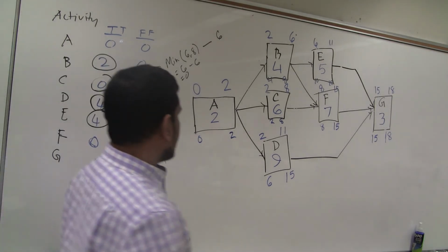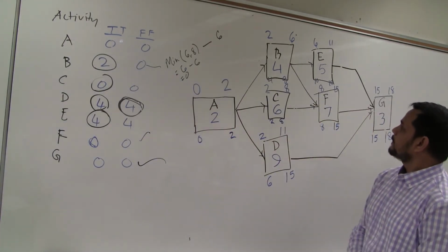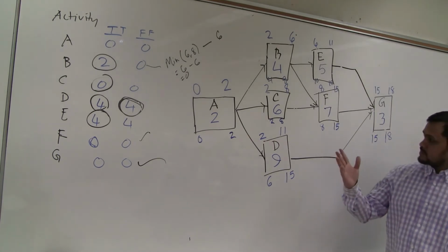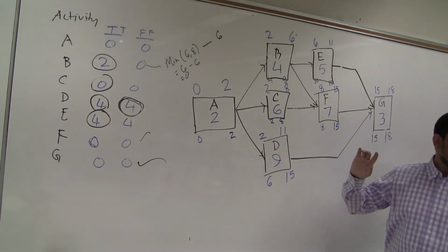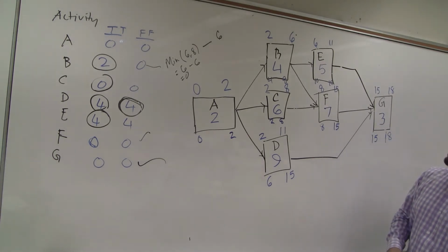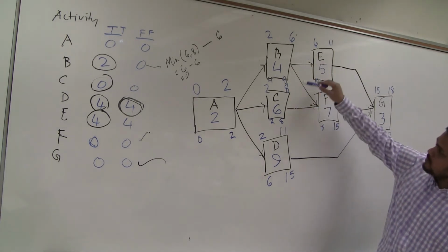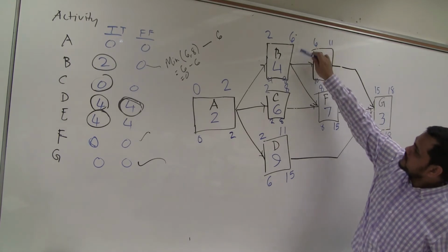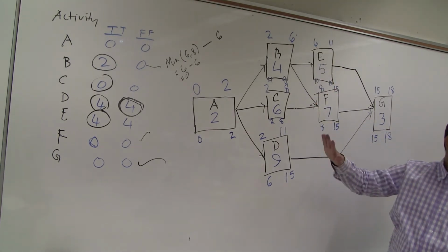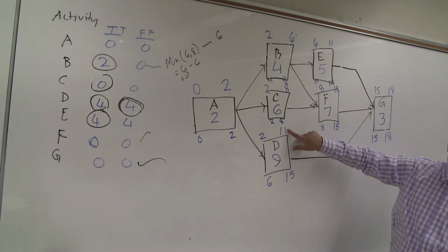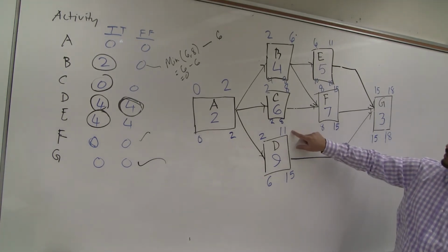Okay, now let us see our critical path. Critical path is the longest path or the path which has 0 float, but we call it the least amount of float. If I go the first column, say 6, 8, 11, it looks like this one. Sometimes it is confusing. It looks like 11, but maybe it's not the answer.